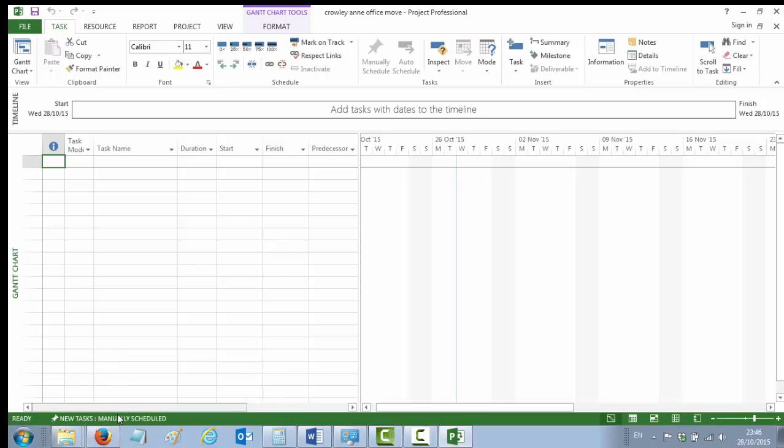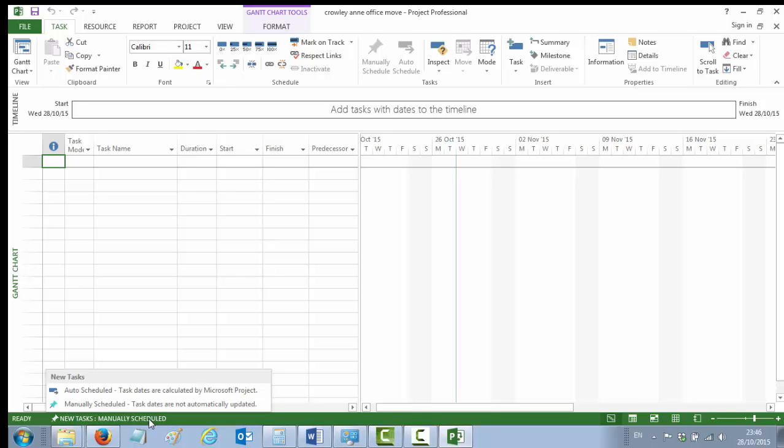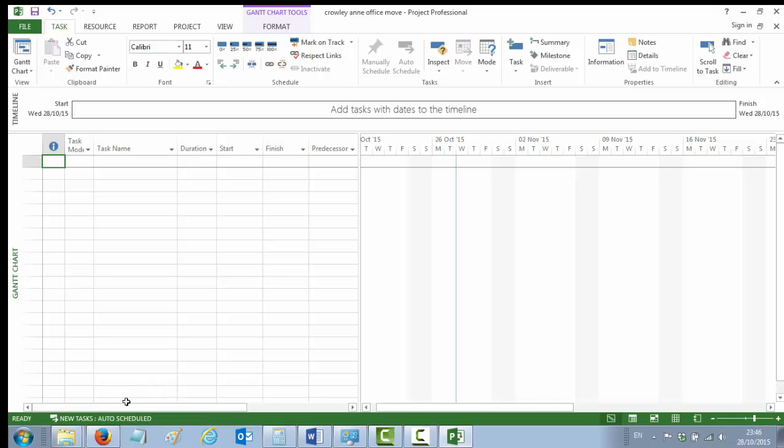Down the bottom of your screen here, you'll notice on the green—it may not always be green on your screen—but on the bottom bar you'll see bits of information. One of the things it tells you is that new tasks are manually scheduled. If you click on that, you get a pop-up menu that allows you to go to auto-scheduled. It says to you that task dates are now going to be calculated by Microsoft Project. That's absolutely what you want—you want Microsoft Project to calculate your project end date as you go along. So you want to change that, and so that's your auto-schedule mode.